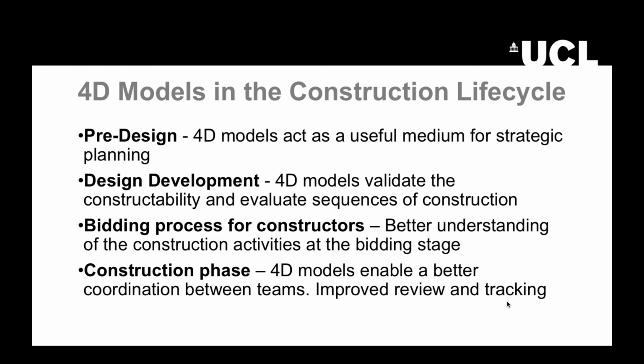Also, the 4D models can be very useful in the bidding process for constructors, especially when the project involves a high degree of complexity. In general terms, the 4D models help in understanding better the construction activities. So, if the contractor has a better understanding of the space, the sequence of activities, and the constraints, the bid will be more realistic and accurate, and all the stakeholders involved in the project will benefit from that.